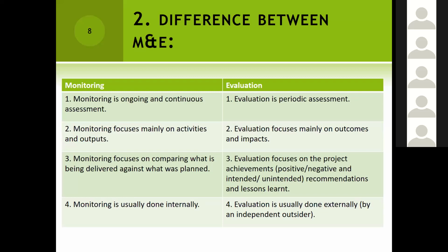Then another thing we find about monitoring is that it focuses on activities and outputs. So you realize that we just look at activities and outputs only, whereas evaluation focuses on outcomes and impacts. A lot of the time it looks at the outcomes and impacts, and that's what we measure when we look at evaluation.